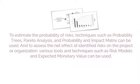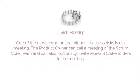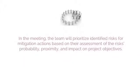To estimate the probability of risks, techniques such as probability trees, Pareto analysis, and probability and impact matrix can be used. To assess the net effect of identified risks, tools such as risk models and expected monetary value can be used. The first risk assessment technique is the risk meeting. The product owner can call a meeting of the Scrum Core team and optionally invite relevant stakeholders. In the meeting, the team will prioritize identified risks for mitigation action based on their assessment of the risk's probability, proximity, and impact on project objectives.